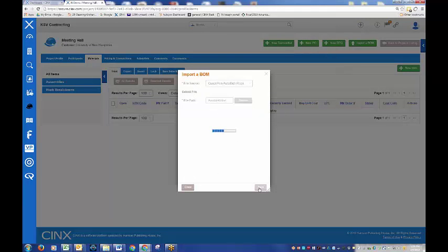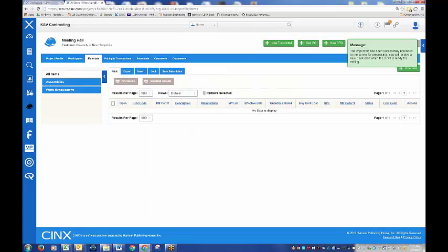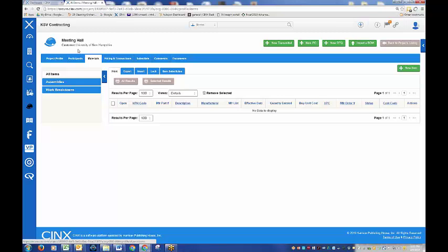Pretty much every estimating tool that has HPH item codes can be imported into CINX. This was an estimate that an estimator completed and was awarded the project. And so that basically starts that linear, repeatable process flow in my company: whenever we are awarded a project, the first thing the estimator does is take all of that estimate data and bring it into a blank templated project so that this data can be made available and shared with other people downstream from the estimator.